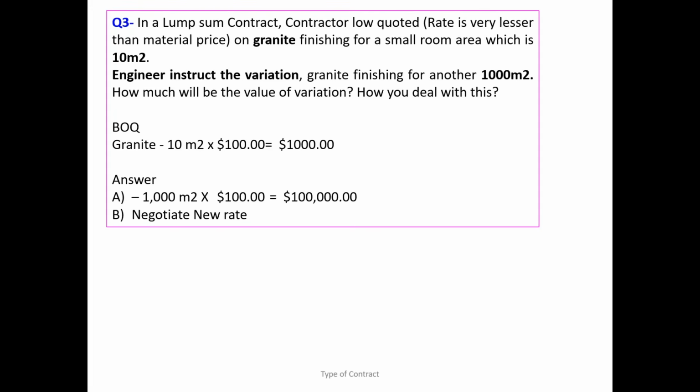Even in the UK, some judgments have been given for B itself, because that is not the scope we agreed and that is not the price standing for the same. But some jurisdictions, some judges, they don't know what type of contract it is. They just think, okay, you agreed the rate, just pay it. They think like a grocery item bill, right? 1 kilogram price this much. Okay, 10 kilogram how much? Do you understand what they are thinking?